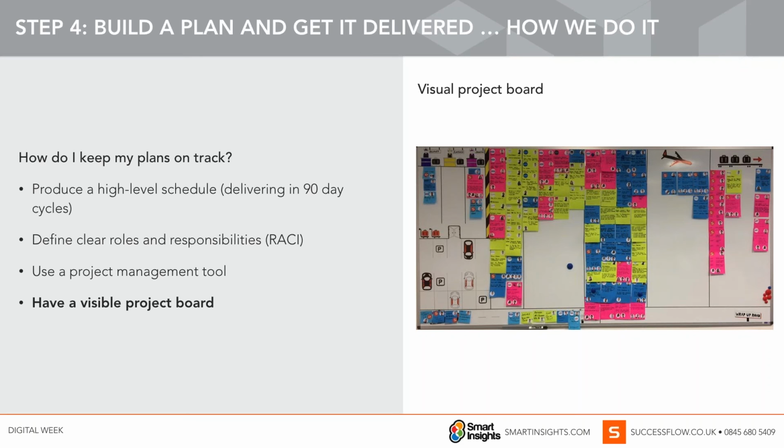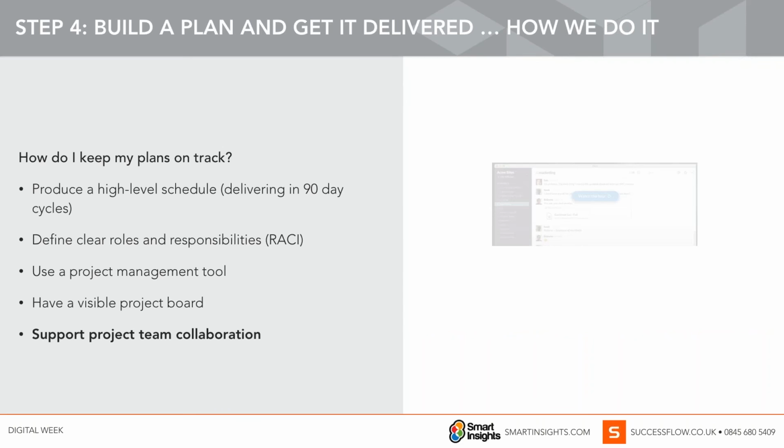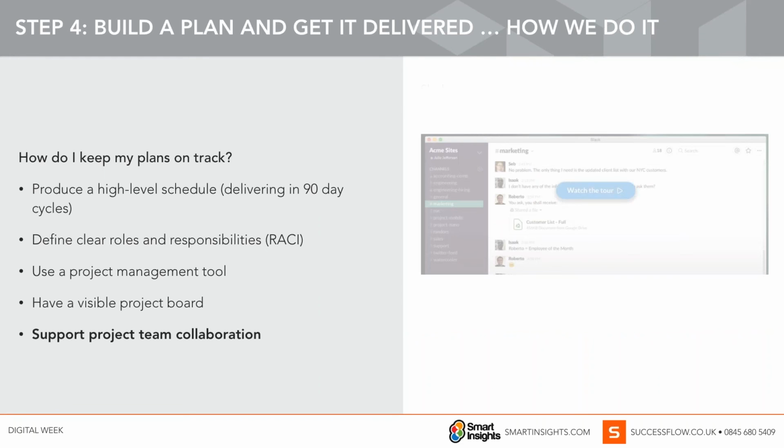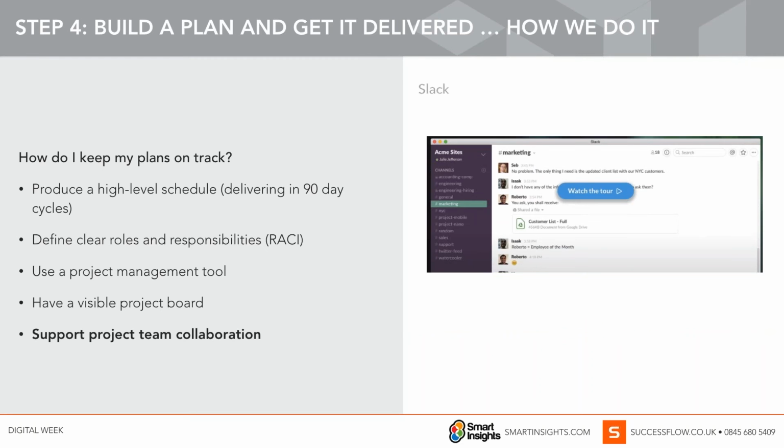And then we've got the last thing there, which is wrap up road. With every single project, every single part of a project, we evaluate it and strongly recommend you do the same. What went well? What didn't go so well? What would you have liked to have known if you'd had more information? Having this visual board is a really good way for any team, no matter how big or small, to track what you're doing every single day, every single week. Thanks for that, Michael.